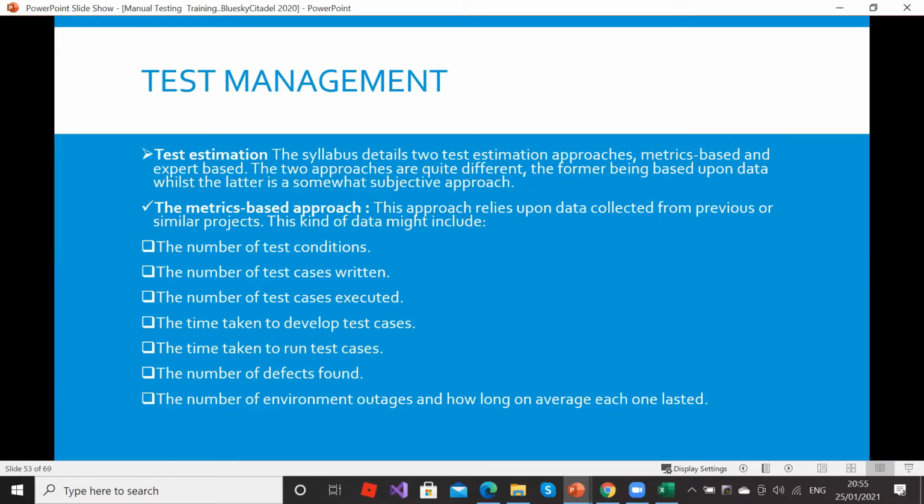So the steps have to be in order. That can take time, but we expect 5 to 10 cases in a day. Some can do 20. It depends on your capacity and the way you understand the system.